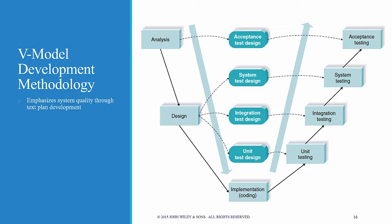Note that when you're in analysis and in design, you begin to think about acceptance test design, system test design, integration test design, and unit test design. So testing is more visible on the radar earlier using the so-called V-model development methodology.